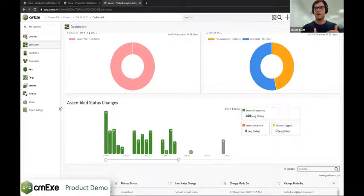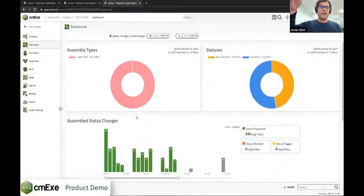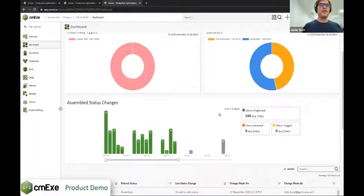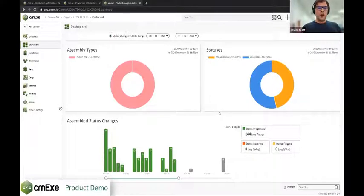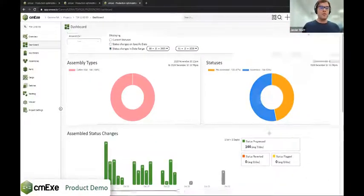When we started building this product, we got a lot of feedback from managers saying, hey, this is great. I can report exactly where all my parts and assemblies are at in a matter of seconds. It used to take me 6 hours to find the parts on the shop floor. And that's fantastic. But for buy-in of going digital, which is a good lesson learned for all of us, we got a lot of feedback from the people on the factory floor that are doing the work. What do I get out of this, right? What's useful for me? Well, this is useful.